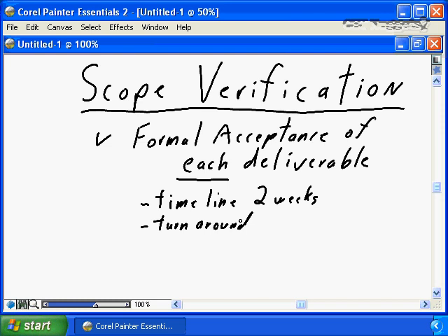This means if the acceptor used several independent reviewers to review the deliverable, you are expecting the acceptor to deliver a single set of comments. Nothing's worse for a project than to get comments back from 3 or 4 reviewers and have the comments from the 3 or 4 reviewers conflict with each other.